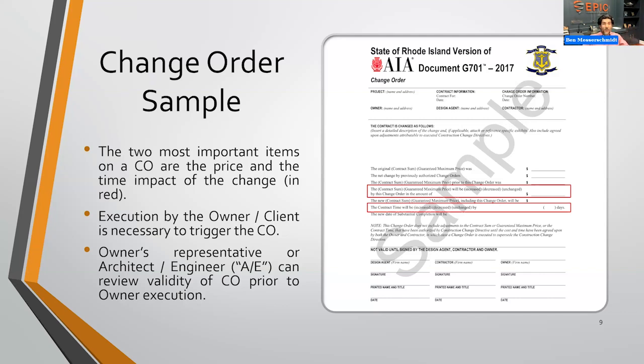What we have seen, at least a few years ago, and less of it now, with all the price fluctuations within the construction marketplace for materials, you saw a lot of change orders trying to reflect that, so the contractors weren't being held to, let's say, pre-pandemic costs. Let's say for a sheet of plywood, for example, which I know went crazy years ago. Sometimes they'll be stipulated in the contract as far as how much percent change can happen, and if it exceeds that, then it would cause a change order.